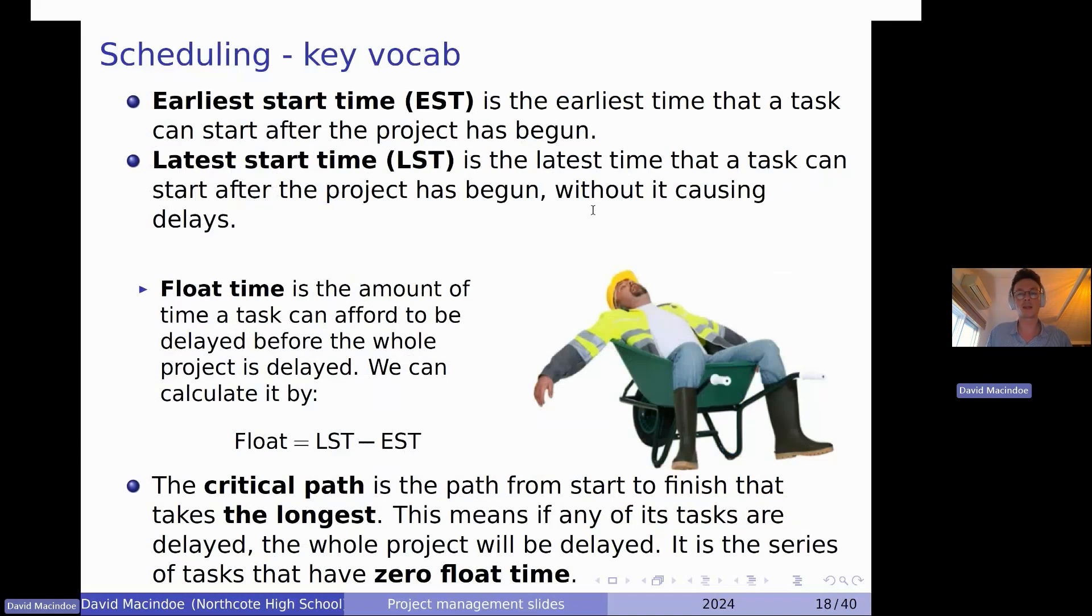Then there's the float time. You can think of that as a bit like this guy here. He's taking a bit of a break. The float time is just this difference between the latest start time and the earliest start time. So we just subtract those two things. That is, what delays can we afford to have for this task in our project?